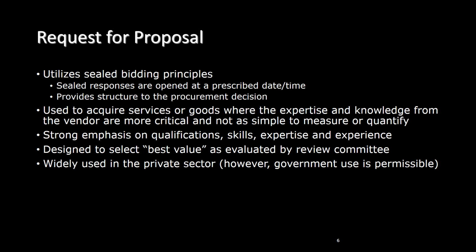Now we will talk about request for proposals. RFPs utilize sealed bidding principles wherein sealed proposals are received and opened at a prescribed date and time. The RFP process brings a structured approach to the procurement decision and is meant to allow the risks and benefits to be identified clearly upfront. RFPs are used to acquire services or goods where the expertise and knowledge from the vendor are more critical and not as simple to measure or quantify.